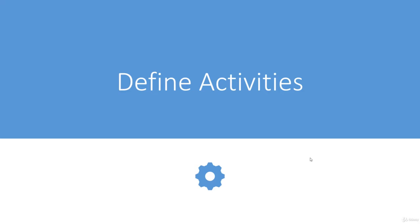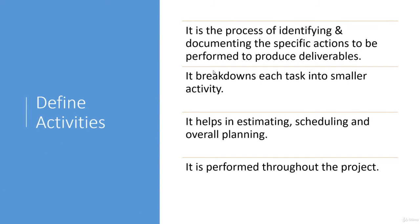Next we have Define Activities. We cannot plan our schedule if we don't know the activities, so we need to identify the activities we are going to perform in a project and the effort they need. In this process, we identify those activities which are going to produce our deliverables. It is the process of identifying and documenting the specific actions that need to be performed to produce deliverables. It breaks down each task into smaller activities — for example, coding can be divided into smaller groups so we can estimate them correctly.